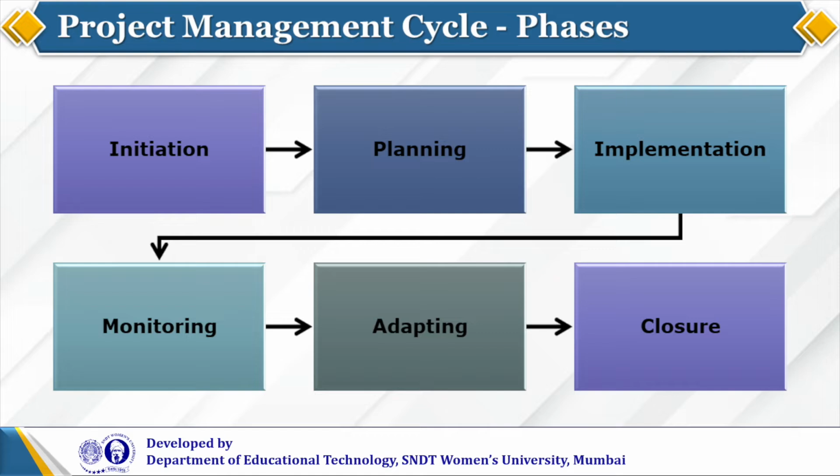There are different books, and they go on refining, as we said, as you learn the project. Now earlier what you see is monitoring and control as a kind of process. Okay, after implementation, now it is split into two. One is monitoring, another one is adapting. So instead of 5, now it is 6 processes. Why is it done? Because it is not only controlling. Sometimes you're not controlling because you find there is a variance. Sometimes you accept it because the situation has changed, and that is known as adoption. So we are not doing correction, we are doing adoption.